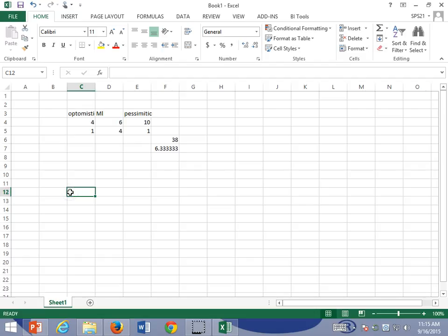So, beta distribution is really nothing more than optimistic plus 4 times our most likely plus pessimistic, divided by 6. It's really nothing more than a weighted average. We're weighting towards that most likely number, but we're taking into account those extremes. Now, is this the only way, once we get that body of knowledge, that history, that we can predict what a task time is going to be? No. And we're going to look at some other models, but this is a very easy model, because everybody in here can divide by 6.